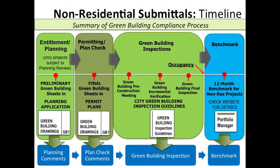Once we get to inspections there are three different phases of requirements included for enforcement. There is a required green building pre-construction meeting. There is a required green building incremental verification, and that's only for requirements subject to incremental verification. There are a limited number of those, so you'll need to check the green building inspection guidelines to determine if your project meets those requirements. And then finally the green building final inspection — projects need to reference the city's green building inspection guidelines shown on the slide.